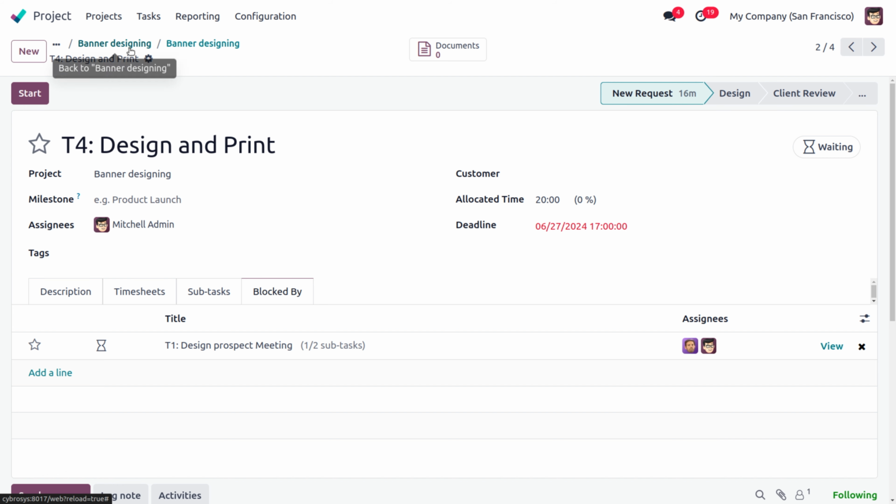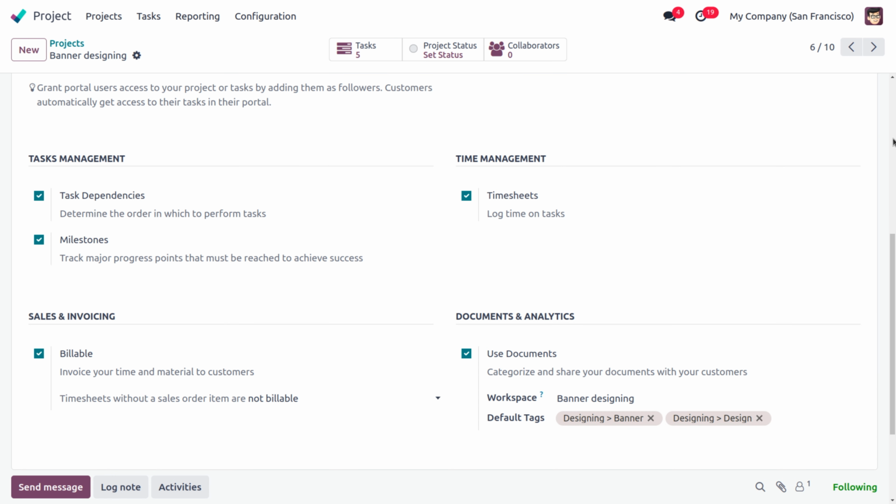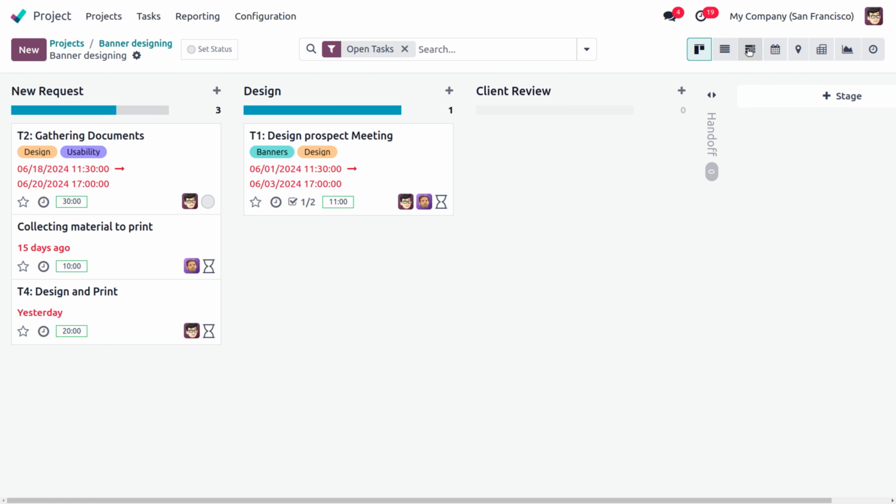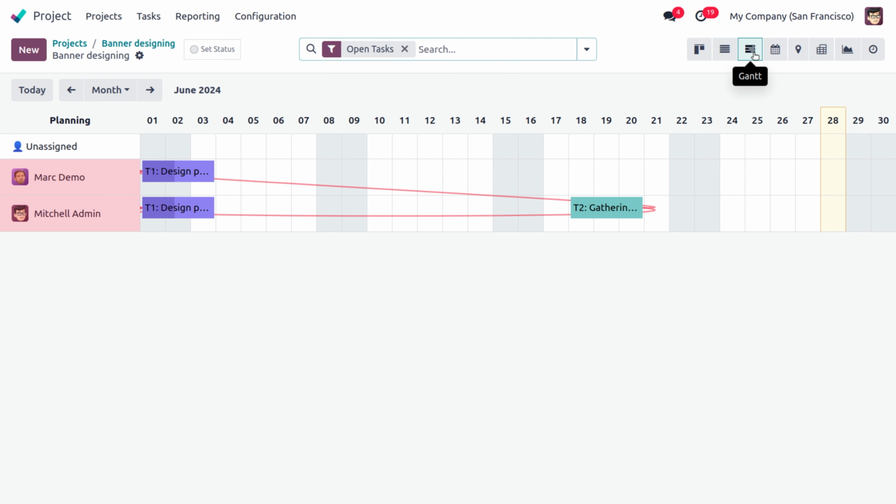And when you move to your Gantt view, that is taking your task status and taking the Gantt view, you can find which task has to be performed first. So you can define T2 has to be completed first, then comes T1. Okay. So the arrow will start from T2 and move into T1. So this is a Gantt representation of your task dependency.